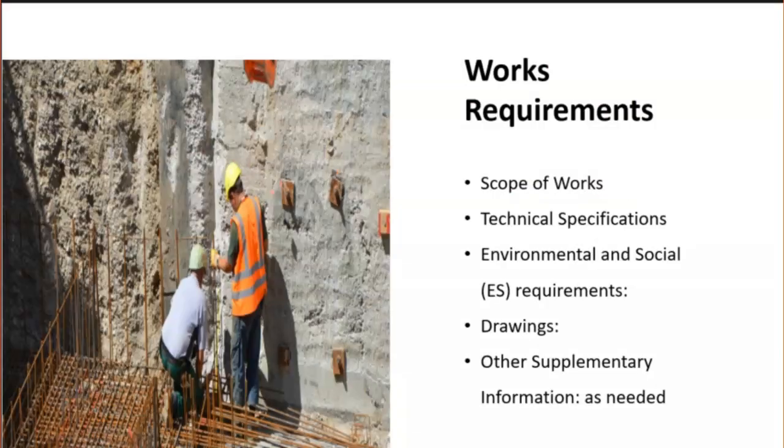Works requirement. The works requirement describes the works to be constructed and typically comprises the following documents prepared by the employer's design engineering consultant: scope of work, technical specifications, environmental and social requirements, drawings, other supplementary information as required.